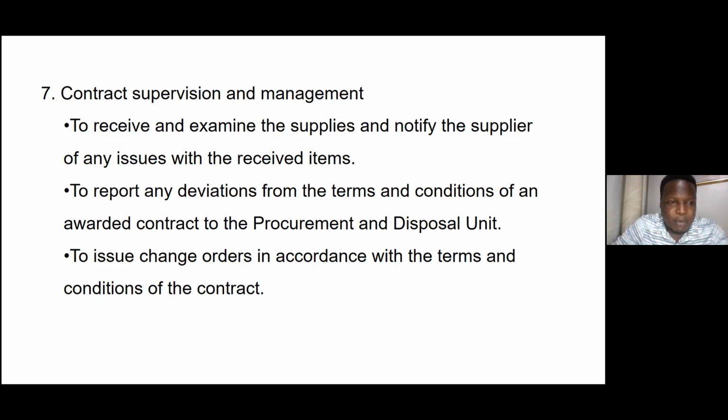They also help to report any deviations from the terms and conditions of an awarded contract to the procurement and disposal unit. They also issue change orders in accordance with the terms and conditions of the contract.